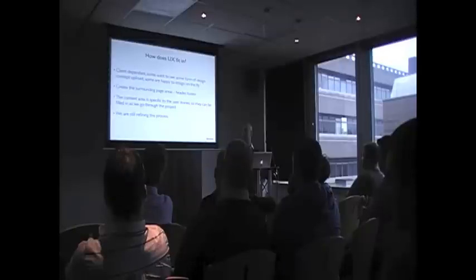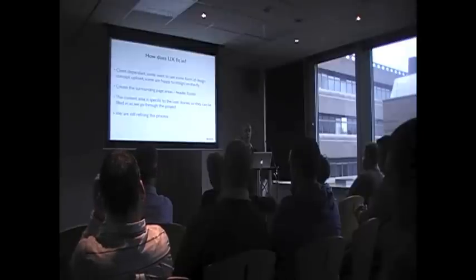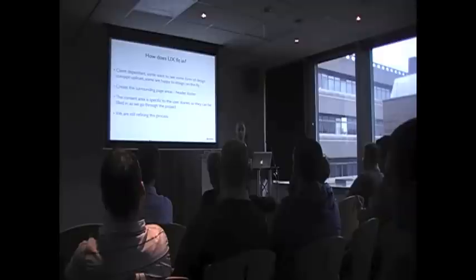The key with agile development is you QA as you go along. At the end of every sprint, if it's a week or 2 weeks, you are QAing, you show it to the client. They are signing it off as done. And if they sign it off and then they decide to change their minds 3 weeks later, we go, well, you've already signed it off. That's actually a change request in the old world or a new user story.